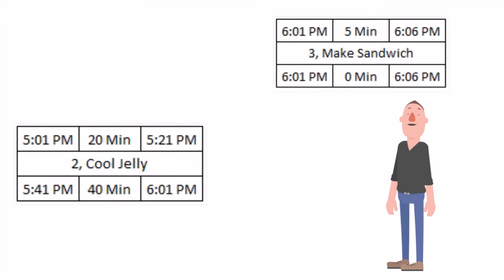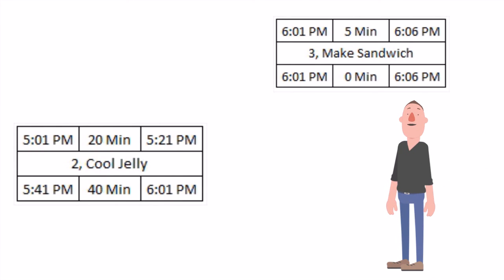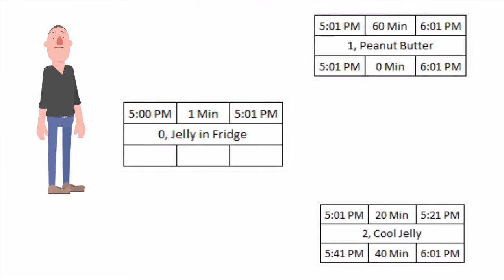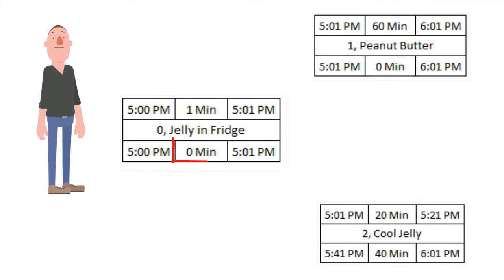So now I know that the latest I can put the jelly in the fridge in this sequence is 5:41. If I wait until after 5:41 to put the jelly in the fridge, I'm going to get hangry. We're almost done with our backwards pass. The late finish for the first activity is equal to the earliest of the late starts between the downstream activities. So the late finish for my first activity is 5:01 p.m. because that is earlier than 5:41 p.m. The total float is the late finish minus the early finish — 5:01 minus 5:01 — which is 0 minutes. And the late start is the late finish minus the duration — 5:01 minus 1 minute — which equals 5 p.m. Our backwards pass is complete.